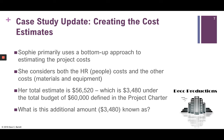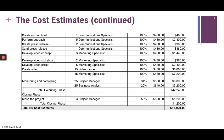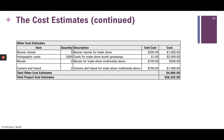This under-budget amount has a name — defined on page 84 of the textbook — known as budget contingency. Ideally it would be nice to bring the project in at $56,520, but we have that extra almost $3,500 to work with. The total human resources cost estimates are $51,920 — the people costs are the majority. Other costs are estimated at $4,600, for a total of $56,520.